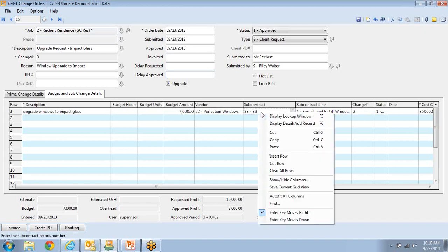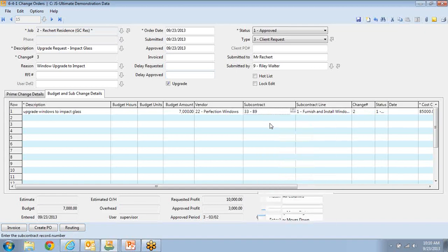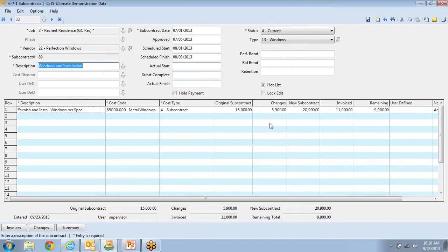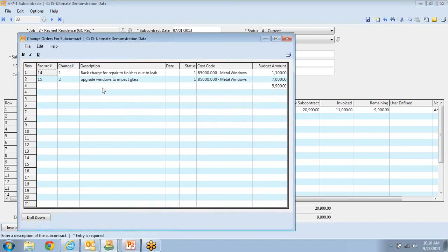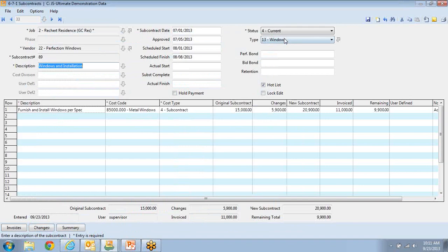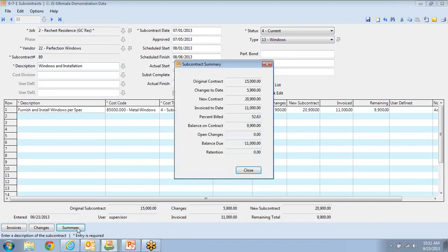And what I mean by fully integrated is when I drill into that contract right from here, this is the very contract I showed you before, and you look at the change order log, you'll see that actual change order being incorporated into their base contract, which upgrades the contract amount.